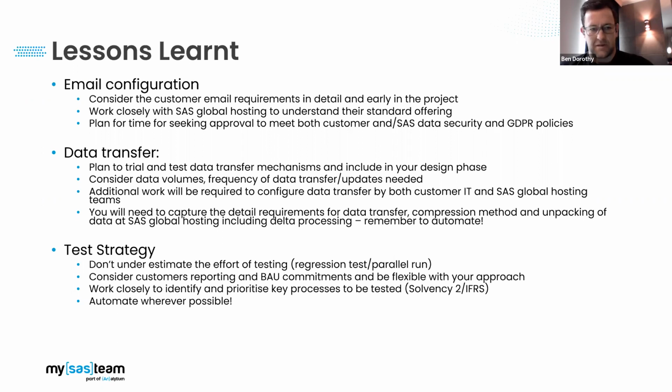So there are potentially at least 2 teams that need to be involved, but once you get into the security and configuration and testing of bandwidth, to move the amount of data you need to move in the timescales you need, you can start to involve quite a lot of teams. You also need to think about the compression method that you use, because there's more than one way to compress your data before you transfer it.